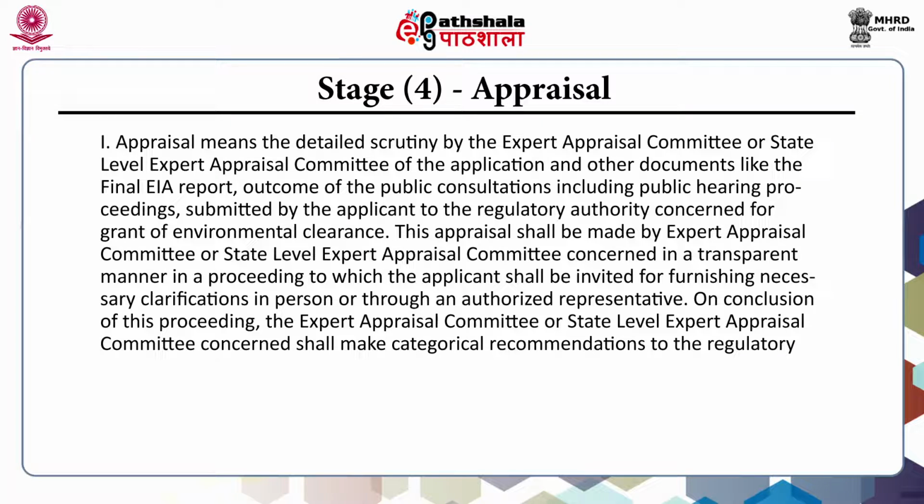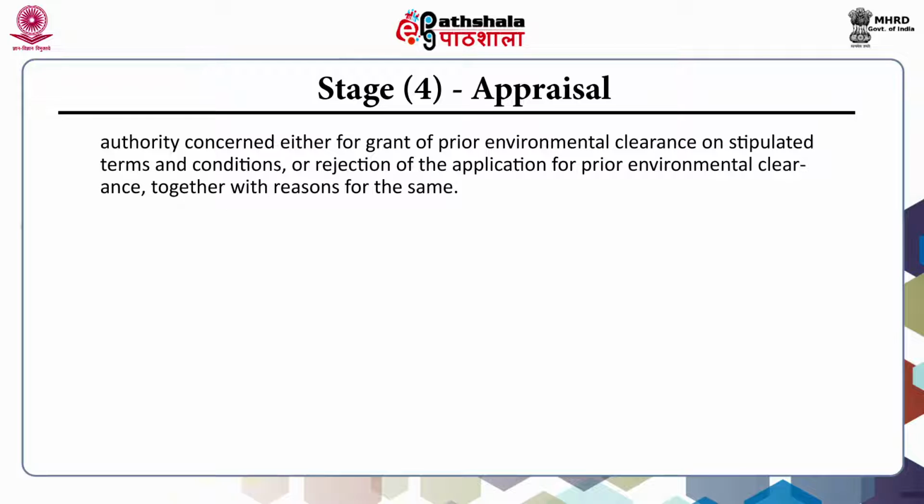On conclusion of these proceedings, the expert appraisal committee or state level expert appraisal committee concerned shall make categorical recommendations to the regulatory authority concerned either for the grant of prior environmental clearance on stipulated terms and conditions, or rejection of the application for prior environmental clearance together with reasons for the same.